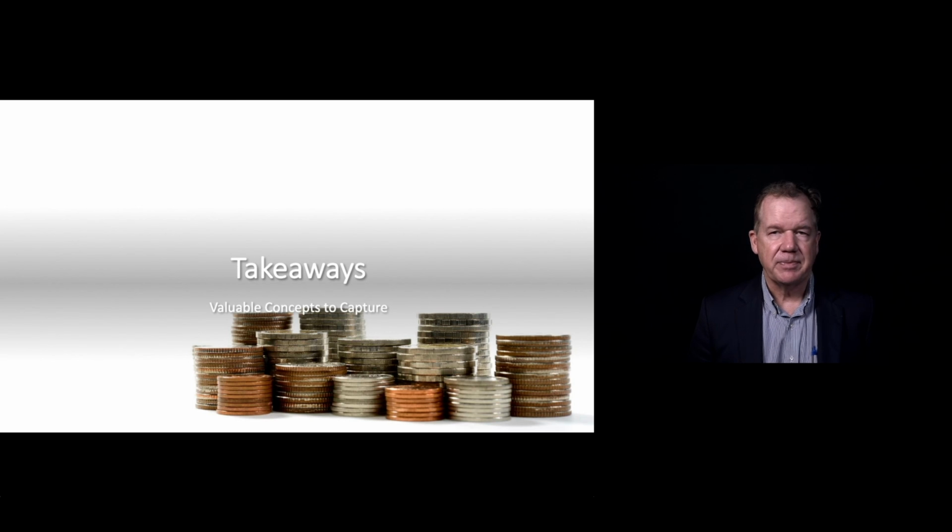General administrative expense can comprise from 3 to 15% of the cost of a project. Therefore, managing with accurate expense allocation should be a primary focus. In addition, in strong or weak economic times, it assists the contractor in capturing good opportunities or winning a project when few are on offer.